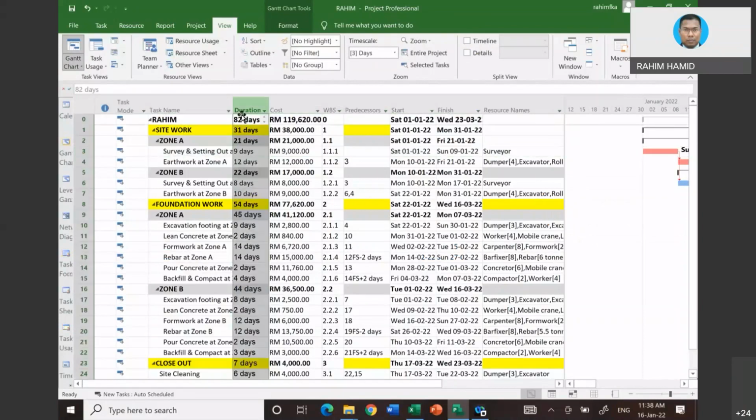You see, the project now becomes 82 days instead of 77. Now it becomes 82 days because we shift one activity by 5 days and automatically it is being added up. If, for instance, you can accommodate 5 extra days, that should be fine. You solve one problem, you can go ahead. But what happens if you cannot afford to have another 5 more days? So you do not want to do that kind of changes.